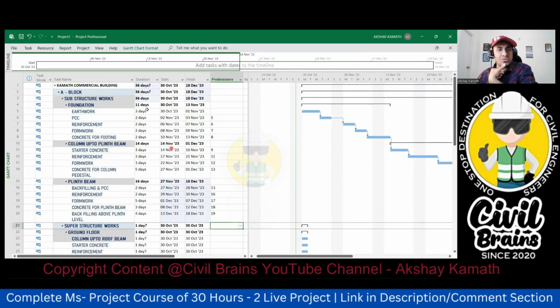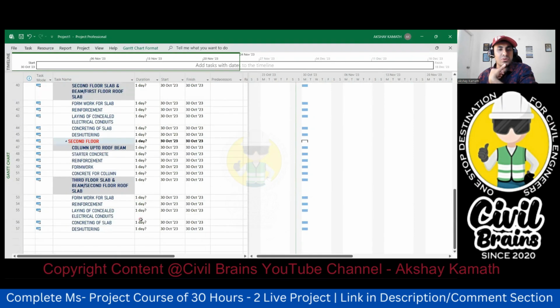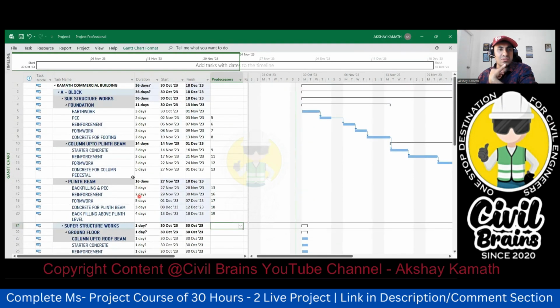So 36 duration is there. Substructure work is done. So again, why is this question mark coming? The reason is that all these things here have a question mark, right? So here you haven't given any proper duration, so that is why it's reflecting here. But for the substructure, earlier there was a question mark coming. The reason was that here I had not given any days, right? In the substructure part, foundation, column up to plinth beam. So from earthwork to this, everywhere the duration is given. So how many days is required? 36 days.